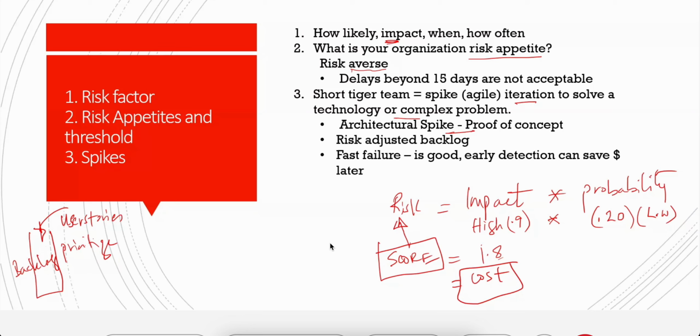So to compare that with the predictive methodology, you're doing your risk analysis with the WBS, the work breakdown structure, the secret sauce, and you're looking at the deliverables. That's how you're determining the risks, by looking at each component there. Just to give you both perspectives, in both cases you have to decompose. Even if you have a user story in agile, you look at the user story, you decompose, and then you do your risk analysis.